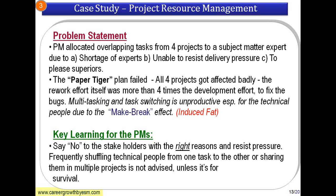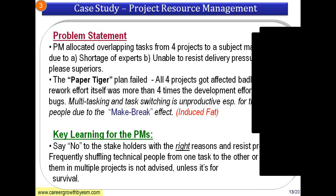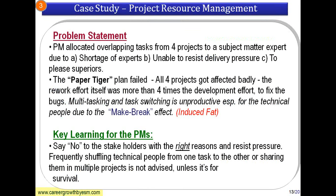So in this particular case, the paper tiger plan has failed because all four projects had different tasks allocated to this particular architect or subject matter expert. It resulted in big rework. The key learning here is that multitasking and task switching is very unproductive, especially for technical people. This is a kind of waste introduced by project managers only, and it should be avoided. People think that since he is a great guy, let me put him on ten tasks — but all ten tasks will get screwed up.